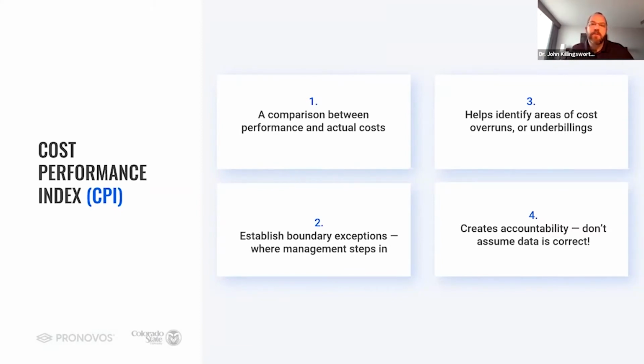There's probably value that you could be earning if your subcontractors are invoicing on time, and if they haven't, right, it's not posted in your accounting software, and it's not considered at that point. So you're not able to invoice for those activities. You want to keep them on track. You want to keep it as close to that on budget as you can.